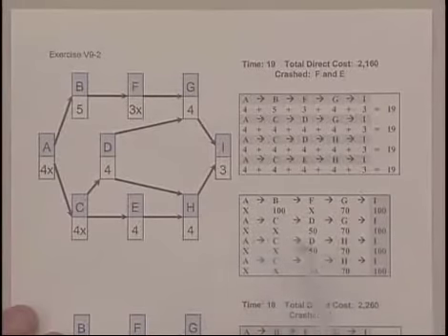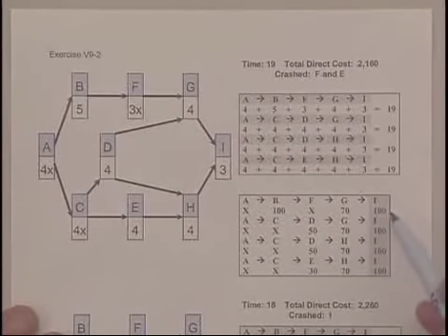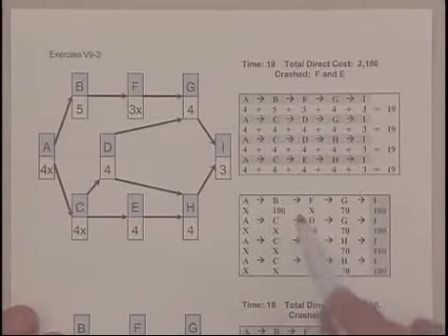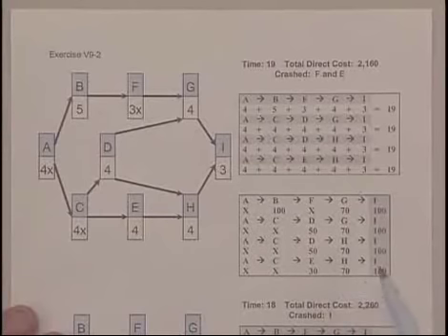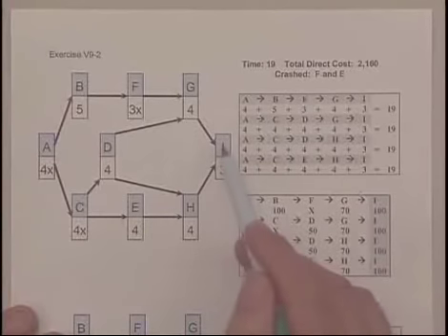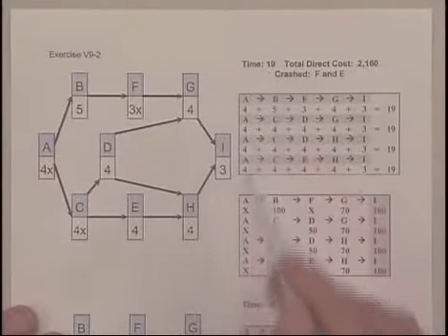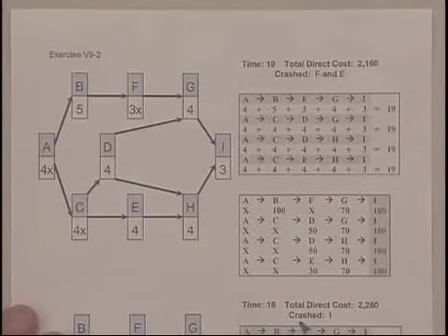So I've drawn out the options here. B is 100, D is 50, H is 70, E is 30. We look at the different combinations, and sure enough, even though I is expensive, we are really, in this case, killing 4 birds with one stone. We influence all four paths, and it's cheaper than any combination of the other 3 or 4 activities available. So we'd go ahead and change I to go from 19 to 18.